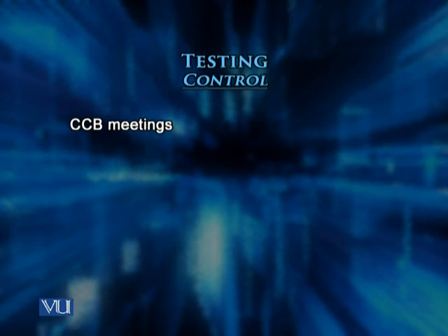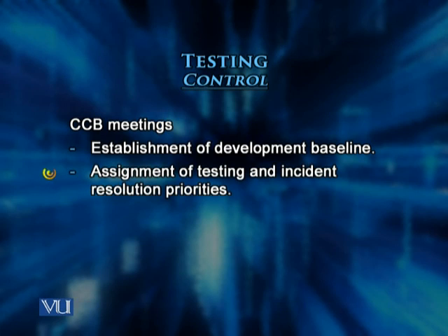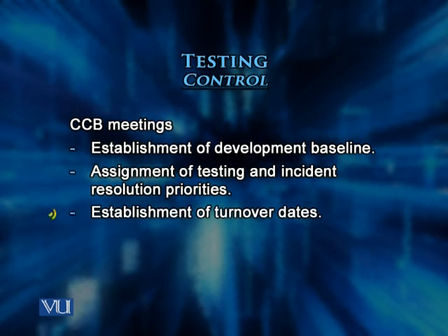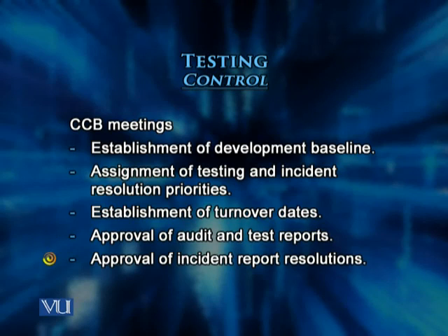These meetings help us in the establishment of development baseline, assignment of testing and incident resolution priorities, and these priorities are agreed on at the CCB level. Establishment of turnover dates, approval of audit and test reports, and approval of incident report resolution.